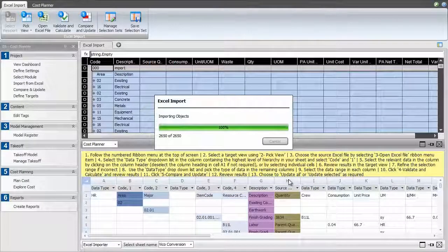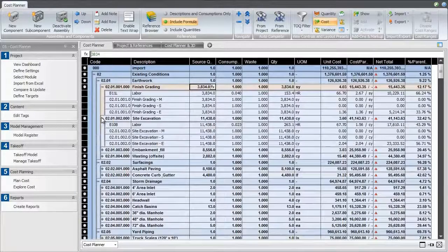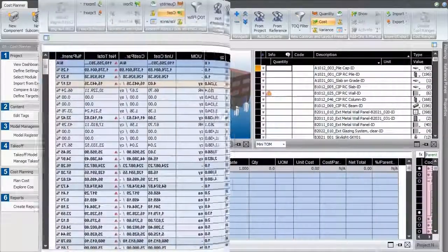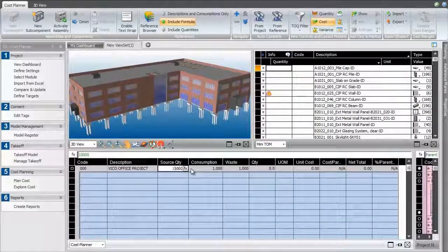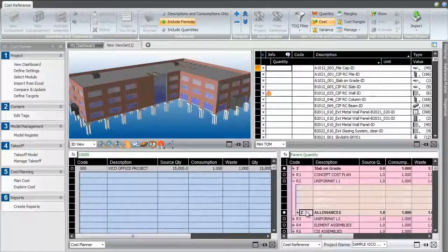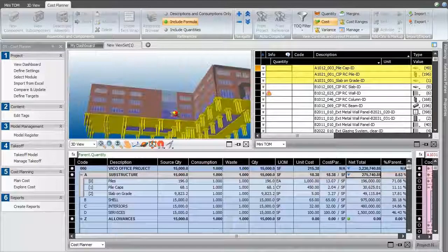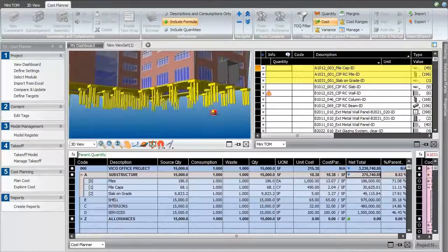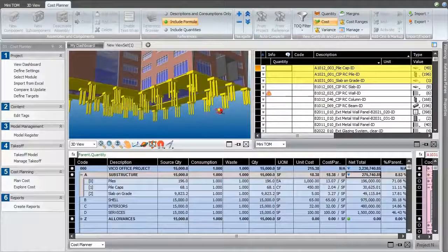We start with many customers simply importing any standard templates or a complete project estimate ready to be developed with model-based data as it becomes available. We could also start from scratch in an Excel look and feel spreadsheet, tabbing between cells and entering data. If we have standard data or assemblies from a previous project, we can just simply drag and drop them into our project. We can now reference these quantities from our consolidated takeoff to complement the cost plan where necessary.